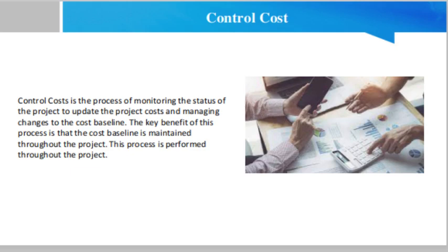Updating the project requires knowledge of the actual cost spent to date. Any increase to the authorized budget can only be approved through the perform integrated change control process. Monitoring the expenditure of funds without regard to the value of work being accomplished for such expenditure has little value to the project other than to track the outflow of funds.